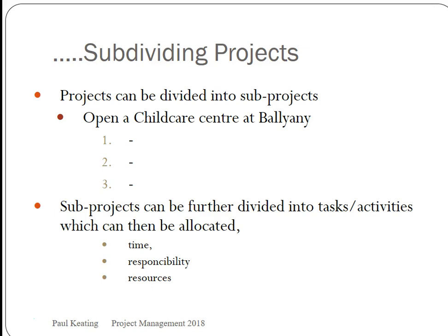And then once you have the sub-projects, what you need to be able to do is allocate to them a certain period of time. How long is it going to take to secure planning? How long is it going to take to design the project? How long is it going to take to implement it? And who is going to be responsible? And then what resources are going to be needed? So for the purposes of project management, what you need to do is break the project down into manageable chunks to which you can allocate time, responsibility, and resources.